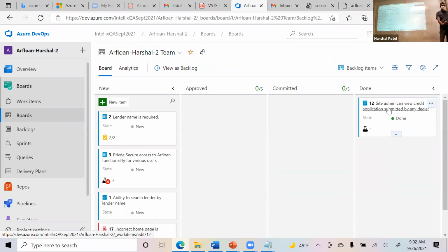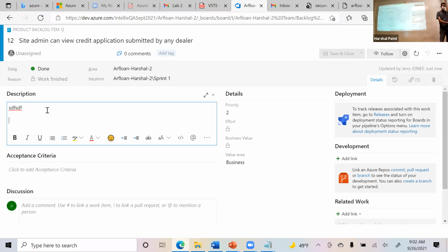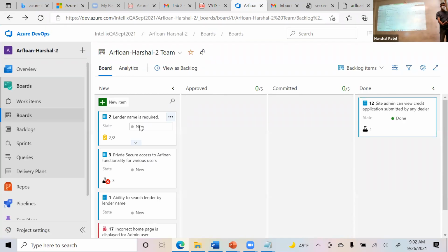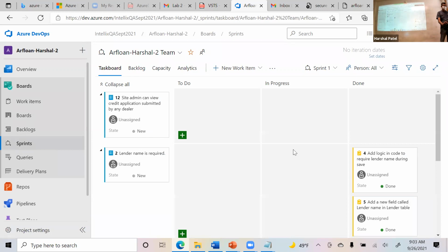Business analysts, right? They might have to go back and forth and get more information from the business on what this thing is supposed to do. So they will keep adding descriptions here or adding more supporting documentation and so forth. So they will make it in progress. And once they are done, they will say it's done, so that the developer can start working on it. Kind of like that. Yeah, every company has their own flow. Generally this flow of approved, committed and done is never used. Every company customizes it for their own need. This tool is highly customizable. Sometimes you might just have the stories as new, that's it, nothing else. Then the developers will just start pulling those stories into the sprint and start working through it, creating the tasks and test cases and so forth.